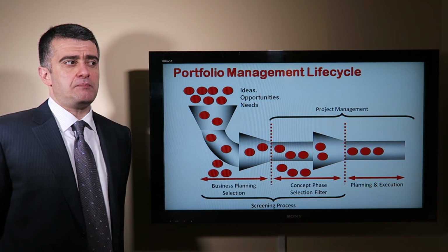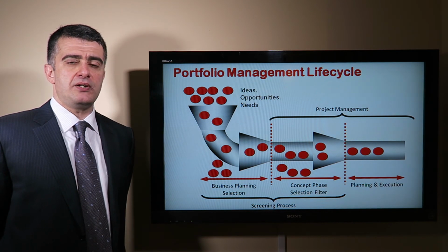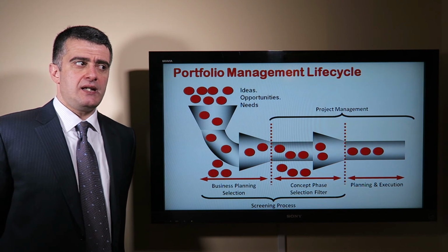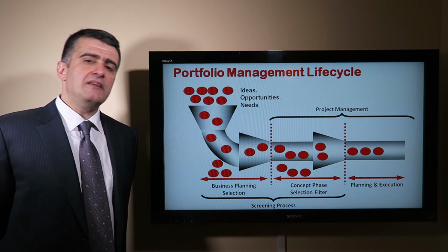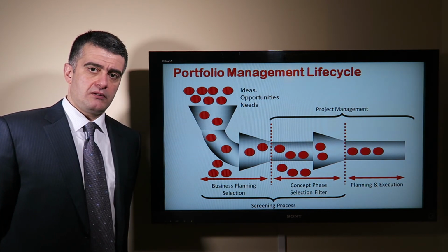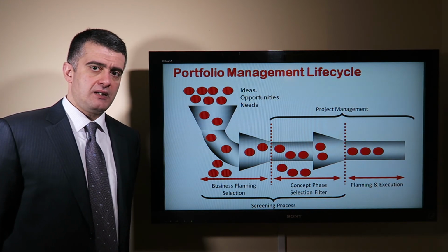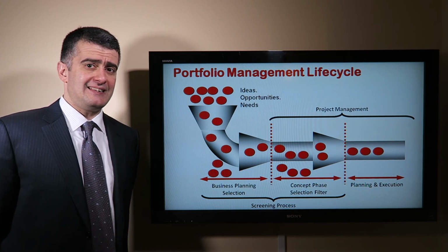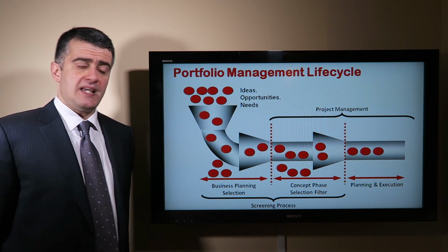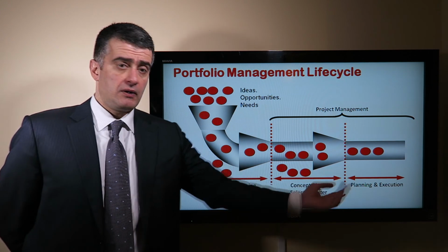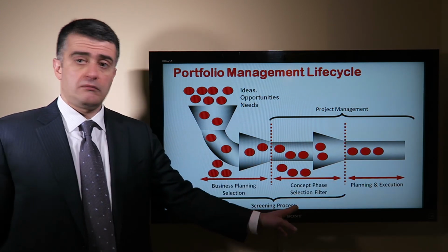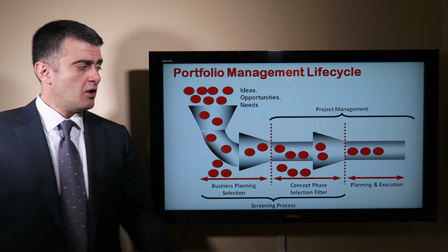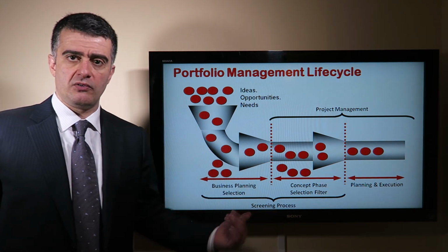In this particular case, you're asking pretty much the same questions in a slightly different way. What you're saying here, having discovered this new information about the project, is it still maximizing our value? Is it still keeping the desired portfolio balance? And is this project strategically aligned? If that is the case, the project goes through. If that is not the case, the project gets killed. And then you go into the planning and execution stages. And hopefully you keep asking the same question over and over and over again.